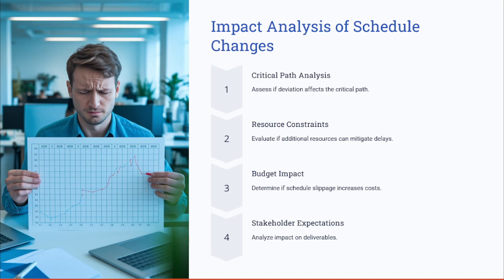Now let's talk about the impact analysis of schedule changes. Key considerations in impact analysis. The first step in managing the schedule deviation is understanding its impact. Okay. Understanding the schedule deviation with its impact: is a task on the critical path delayed or not? Also, is the project completion at risk?